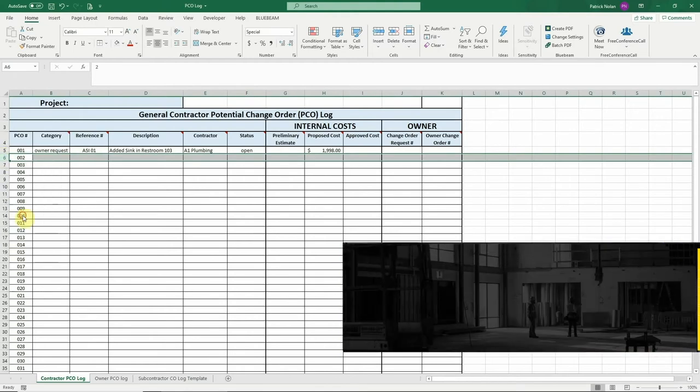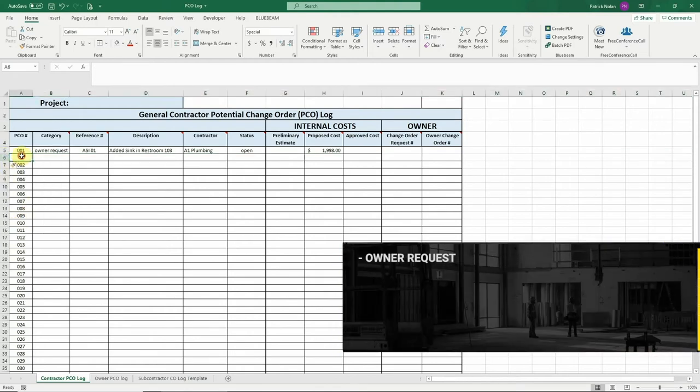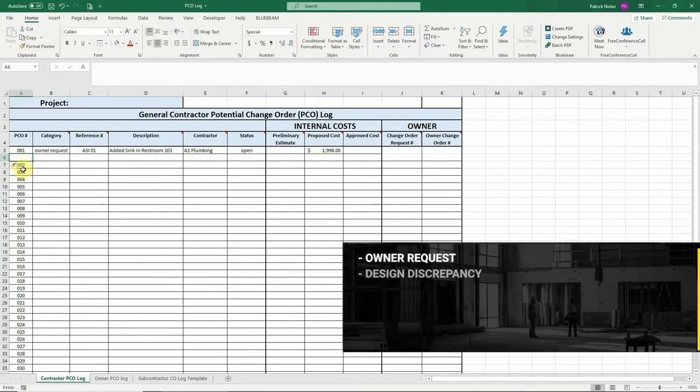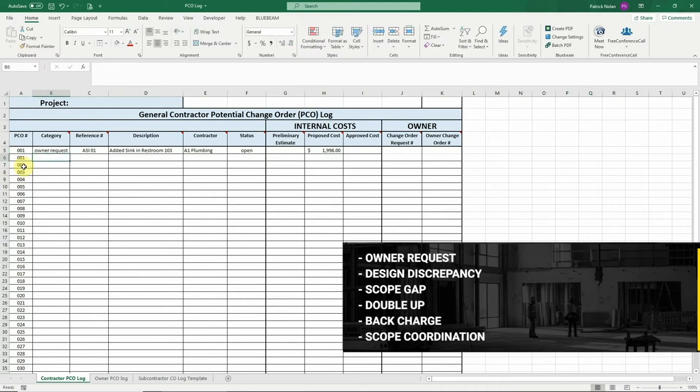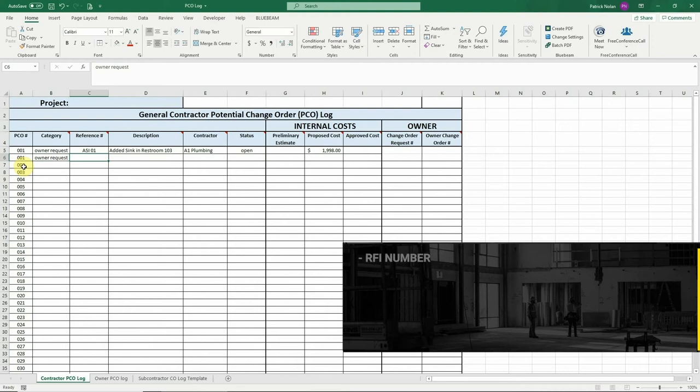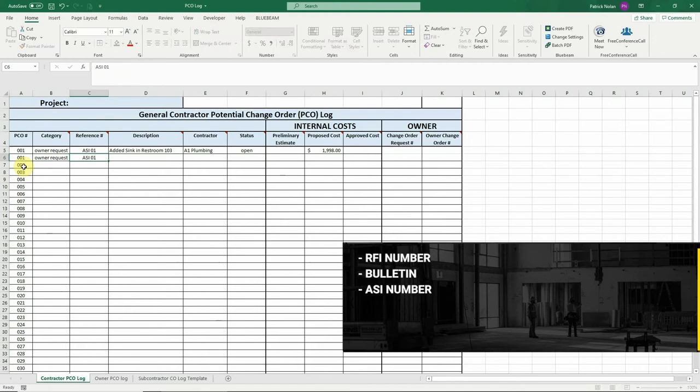The category may be something like an owner request, design discrepancy, scope gap or double up, back charge, or scope coordination. The reference number could be an RFI number, bulletin number, ASI, or something similar.